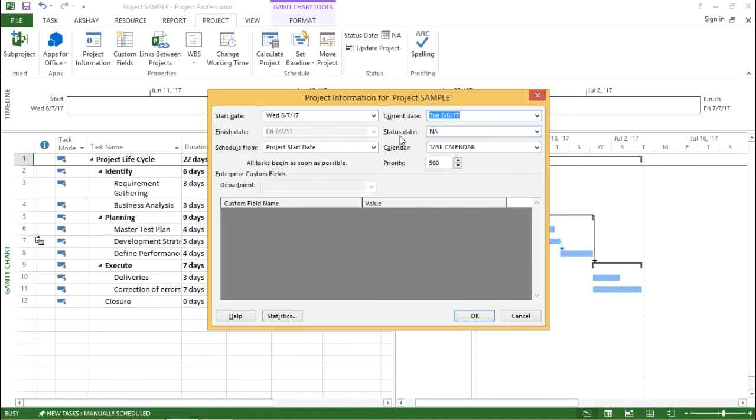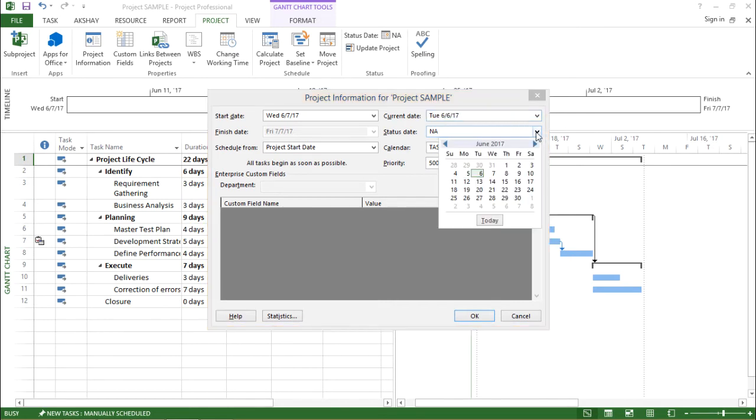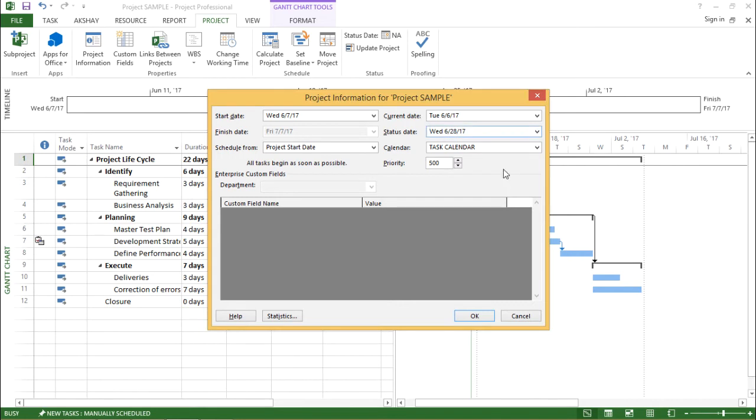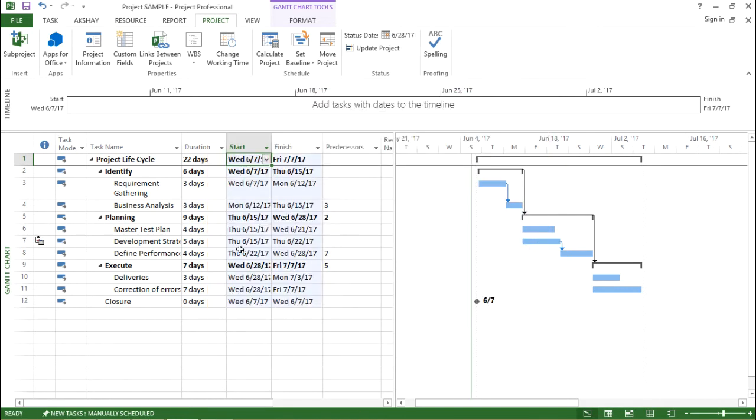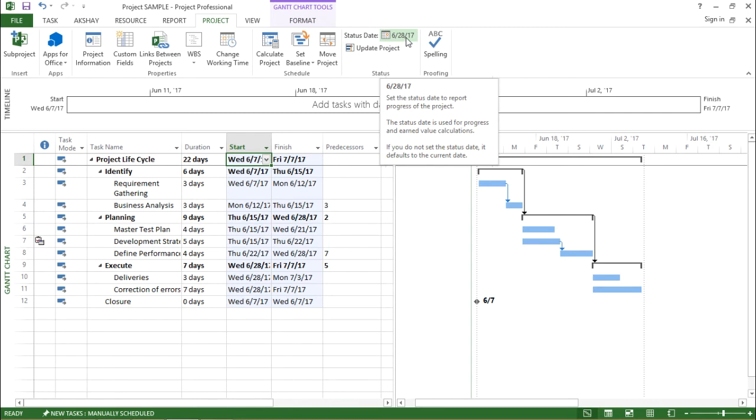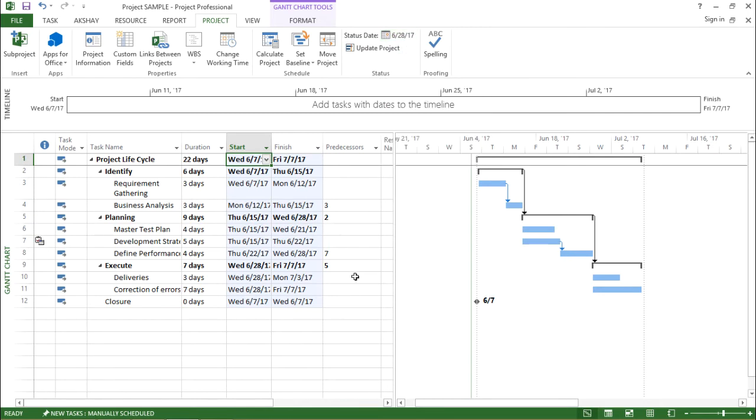Moving on, the next one is the status date. Now what is status date? If I click on this drop down box, the status date drop down box, it gives me a calendar, a generalized calendar. Let's take 28. So I'm taking the status date as 28 and see what happens. The moment I hit OK, under the project tab, there has been some update under the status group. It says that status date is 28 of this month, that is 28 June 2017.